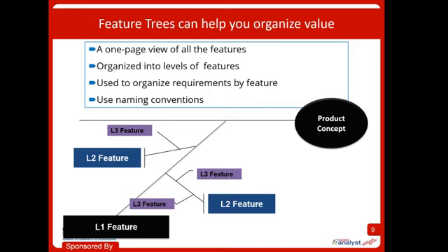Remember, though, all your business objectives that we just talked about a minute ago have to map directly to the features, or really your features have to map back to those business objectives, right? If the feature doesn't actually add value, then we don't want to build it. And the ones that add the most value should be the ones we build first, right? So if we were looking for something like a $1 million return on a project, and we have some features that are worth about $100,000 in value, and others that are worth $10,000 in value, well, which one are we going to build first? Very clearly, we should build the $100,000 features first.